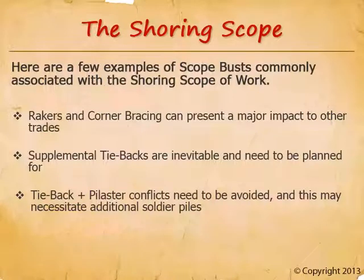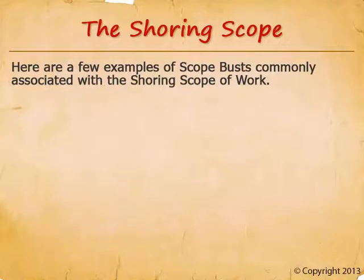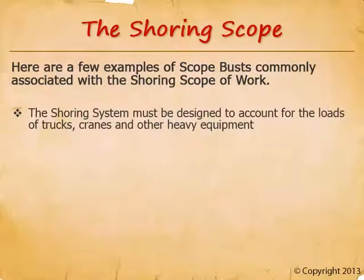Tieback-pilaster conflicts need to be avoided, and that may necessitate additional soldier piles. Pilasters are routinely very highly congested with rebar, so much so that tieback heads and waterproofing boots just won't fit. This means the soldier piles need to be shifted to avoid the pilasters, which will affect soldier pile spacing and may require additional soldier piles due to inefficient spacing. This needs to be included in the shoring bid instructions, otherwise you're going to wind up with a change order issue. Similarly, we need to be sure that the tieback heads don't align with the floor decks or parking ramp. The shoring system needs to be designed to account for loads related to trucks, cranes, and other heavy equipment. Shoring systems are traditionally designed for fixed loads only — such as soil and adjacent buildings — not for live loads like trucks, dewatering settlement tanks, office trailers, or cranes.